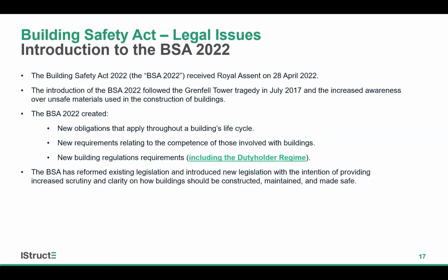So these changes were introduced to allow building owners and occupiers to bring claims for historic defects and ultimately to hold liable those accountable for the defective works. But as we've seen in the case of URS versus BDW, it also enables developers to pass on claims to the design team for claims arising under the Defective Premises Act within the extended limitation period.